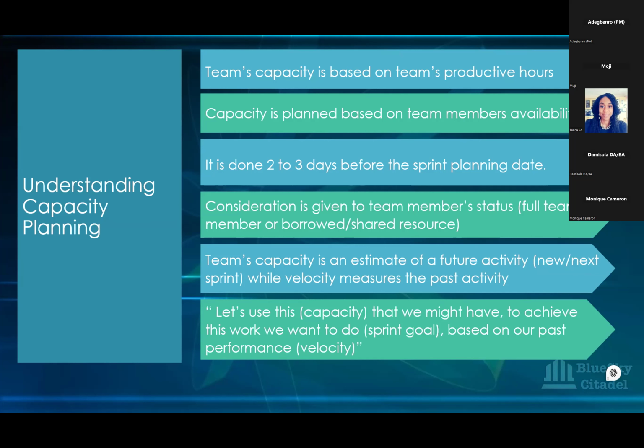So when you're going into a sprint and the PO is looking at it and says, well, their average velocity is 100, so as long as I've put in anything that totals 100, they should be able to do it. When you don't have full capacity, that's where you negotiate with the PO. Yes, our average velocity last time was 100, but that was at full capacity.